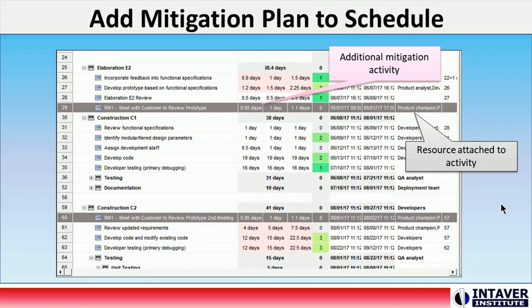Once we have created the pre-mitigated baseline, we will add mitigation activities to the schedule as per the plan. In this case, two additional meetings are scheduled with the customers to minimize the impact of the risk on the project. Notice that the risk activities have resources associated with them. Therefore, they not only have a schedule impact, but the cost of the resources assigned to the mitigation activities will also be accounted for.